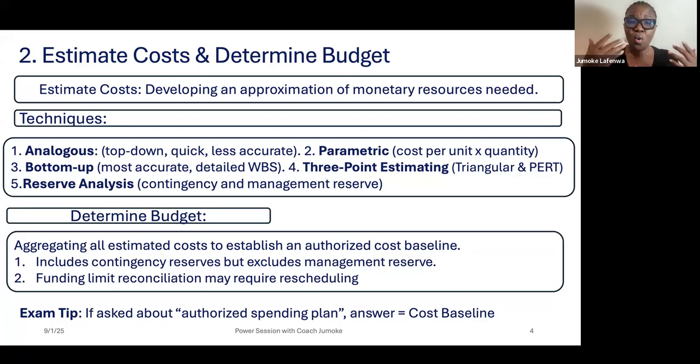review or revise all associated documents that the accepted change would impact, and cost is to be part of it. So the first cost baseline you have, by version control, can be version 1 or maybe A, however you and your team decide to distinguish. And then the second one will be version 2. So maybe after the acceptance, it's no longer 60,000. The cost baseline has now increased to 70,000. That 70,000, from that point, becomes our newest cost baseline.